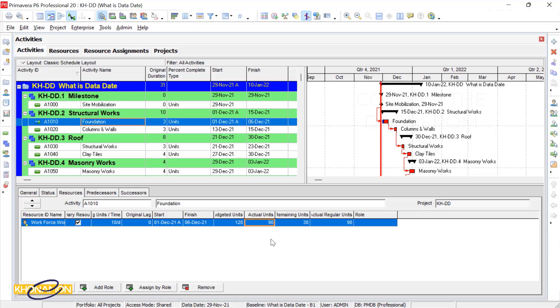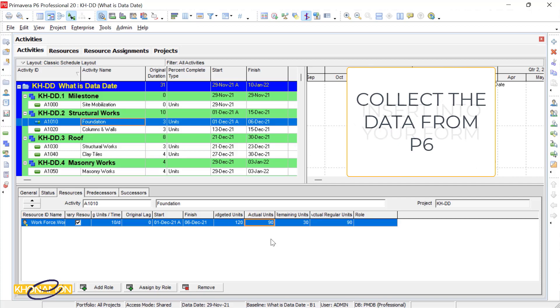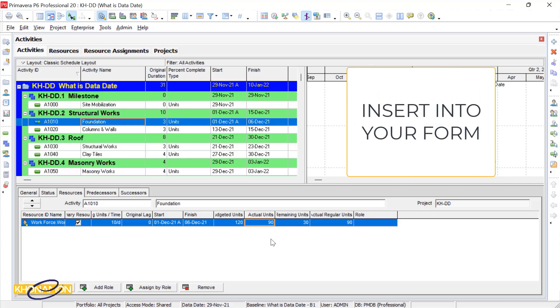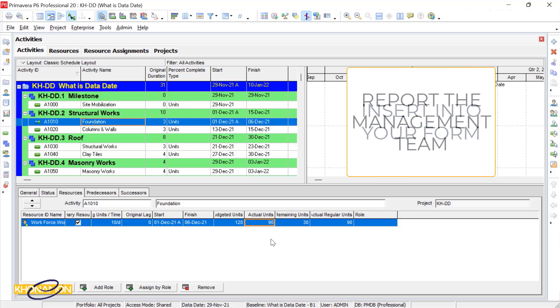After updating the project, P6 knows its job and does its best to show you the status of the project according to the updates you entered. Collect the data, insert it into your weekly or monthly report form, and report to the project management team or even the client.